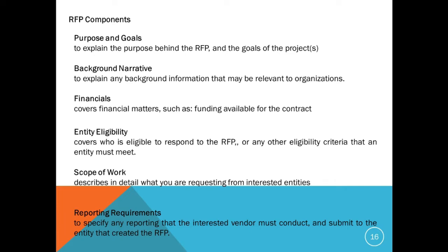Then entity eligibility. This is also a very important point in the RFP that tells the bidder about the eligibility to respond to the RFP. The eligibility may require some kind of certification, some kind of expertise, some kind of licensing. Based on this eligibility, only the corresponding bidders can apply in response to this RFP.